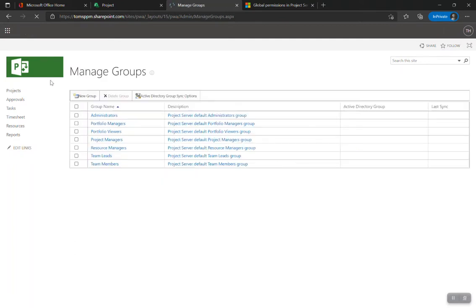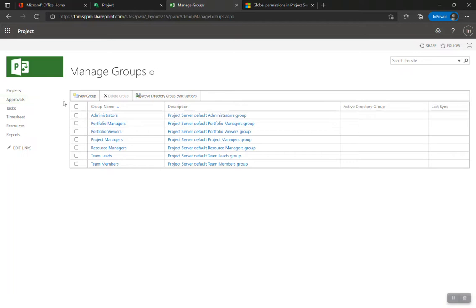I'm going to create a custom group with a one-to-one group-to-category relationship — that keeps it really simple. I'll also create a custom category for my custom group rather than using three different categories. For example, for project managers, I'll assume what they can do, but I'll also say they can edit their own projects but only see everyone else's projects — in that case you'd need two categories anyway.